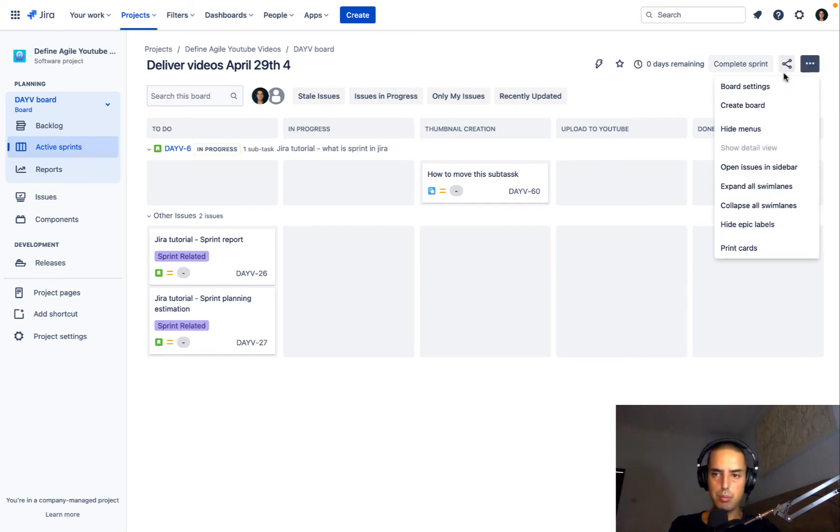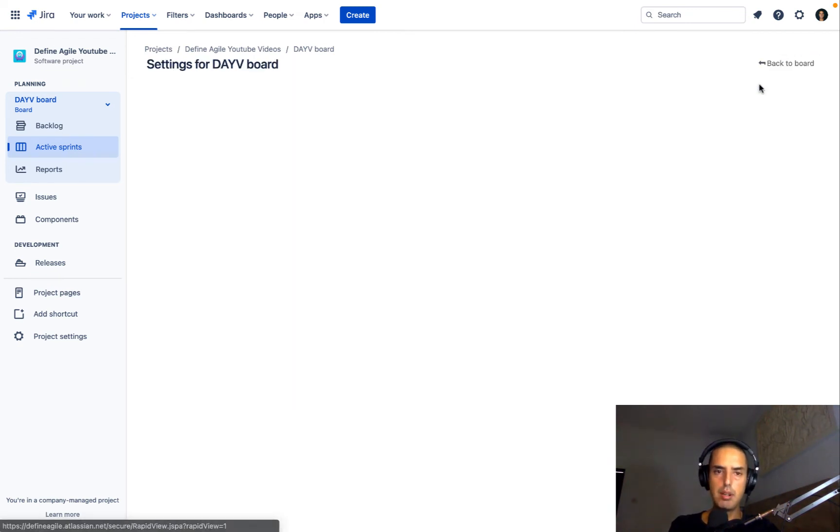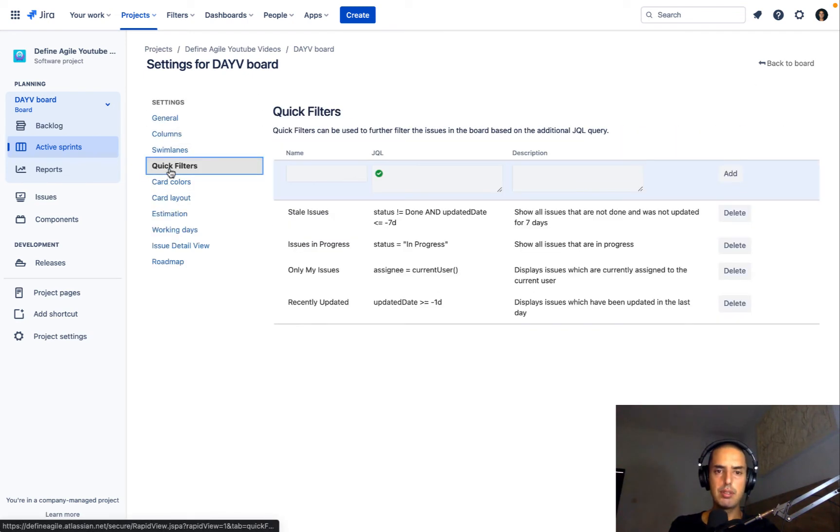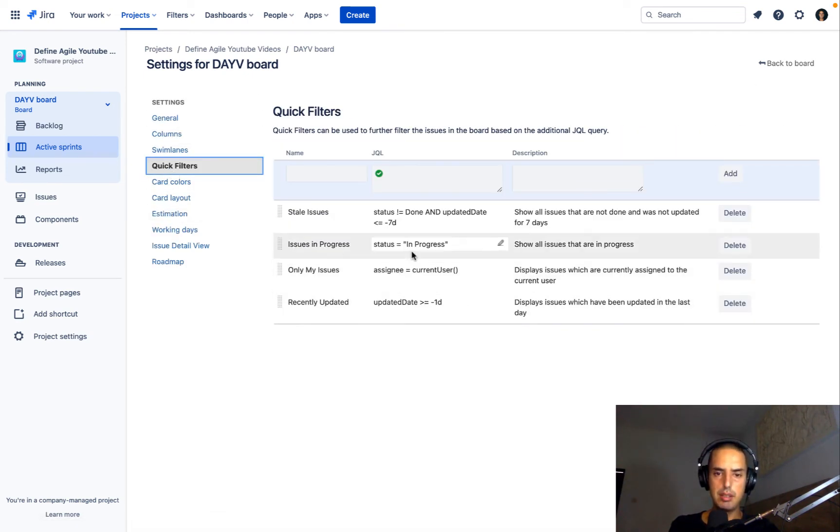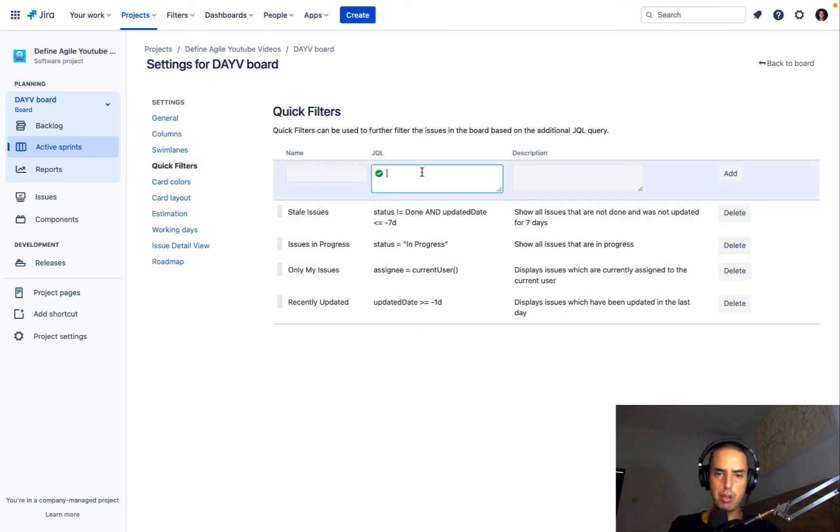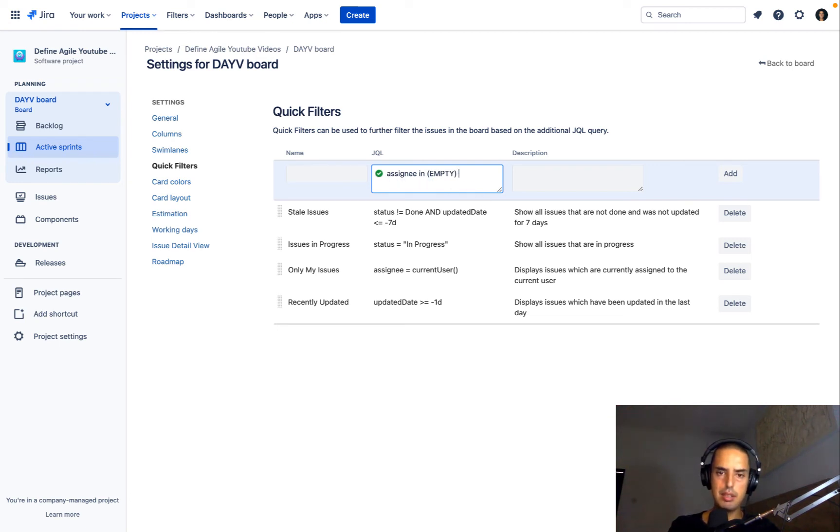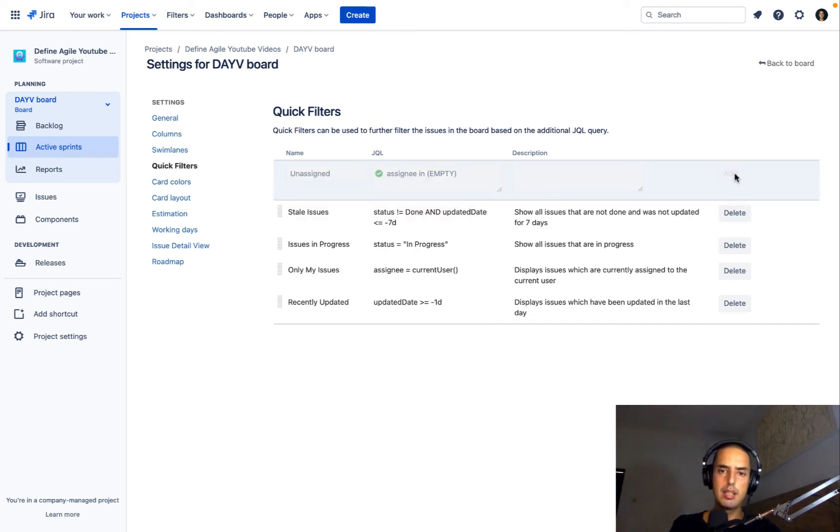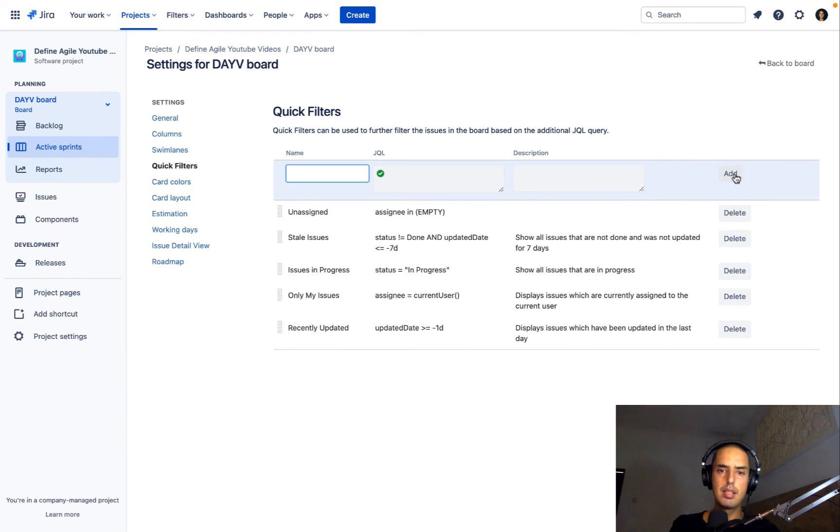So you go to Board Settings, three dots, Board Settings, you go to Quick Filters, and here, see you need this Jira Query Language. So we already did that, so I copy-paste, Assignee is empty, I don't need anything else, and I just need to create a name, Unassigned. Click Add, it added, I go back to my active sprint.